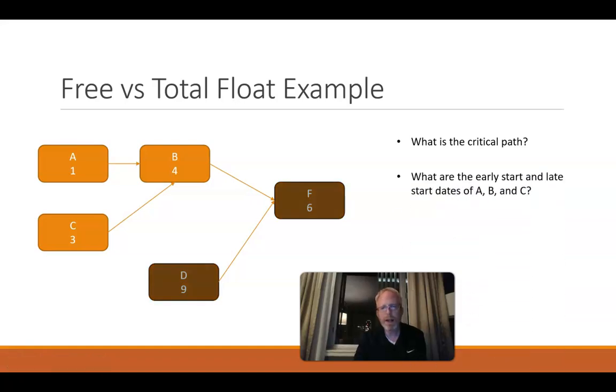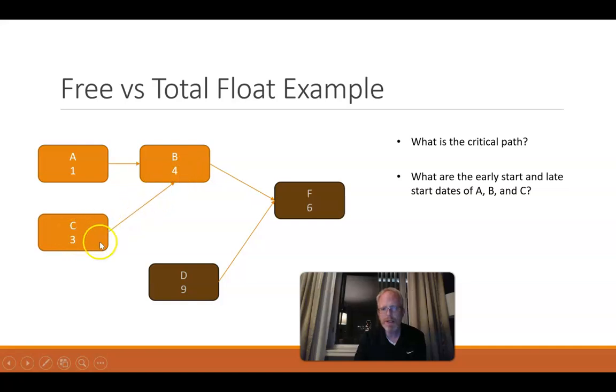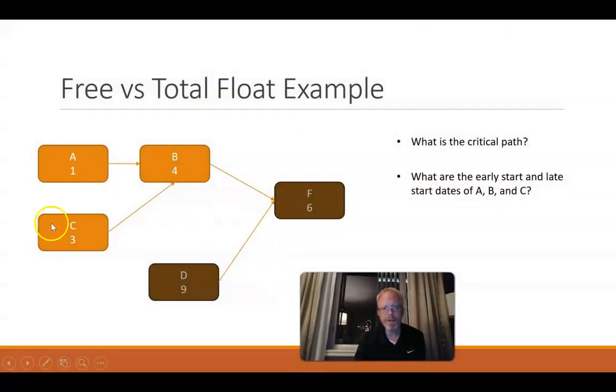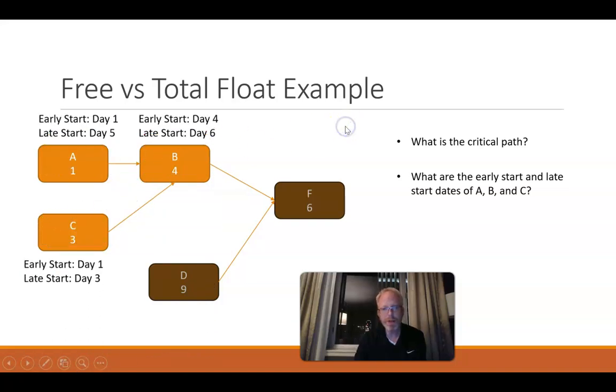Now, what are the early start dates of A, B, and C? A and C are straightforward — we could start either of those on day one. Task B is a little more tricky because B can't start until task C is finished. We consider working days to be full days, starting from the morning of day one. So a task that takes three days runs from day one to the end of day three, and the next task starts at the beginning of day four. Given that, early start for A and C are both day one, and early start for B is day four.